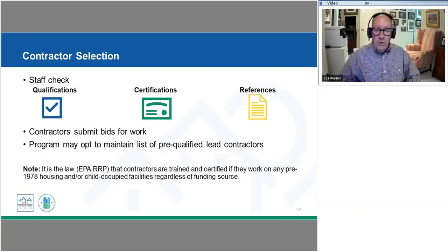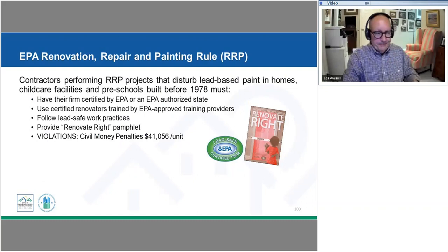I think at this point, generally folks have found that that's much better, but you can certainly work with existing contractors, encourage them, help them identify, and we showed you the links earlier with EPA identifying where there was training available, and encourage contractors to get that training, because that's going to be part of the qualifications that are going to be required for them to be eligible as bidders on some of the work that you will be going through procurement on.